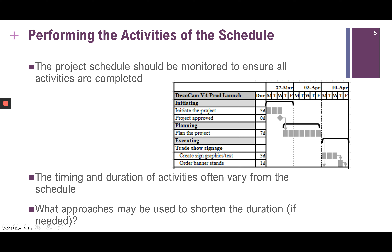Overlapping activities can be risky because the more you overlap, the greater the potential for mistakes or rework. It's also more difficult to manage. Another option is to add more resources to your project — for example, if one person is assigned to create sign graphics and it takes three days, adding another person might reduce that to two days. Adding more resources is often called crashing.